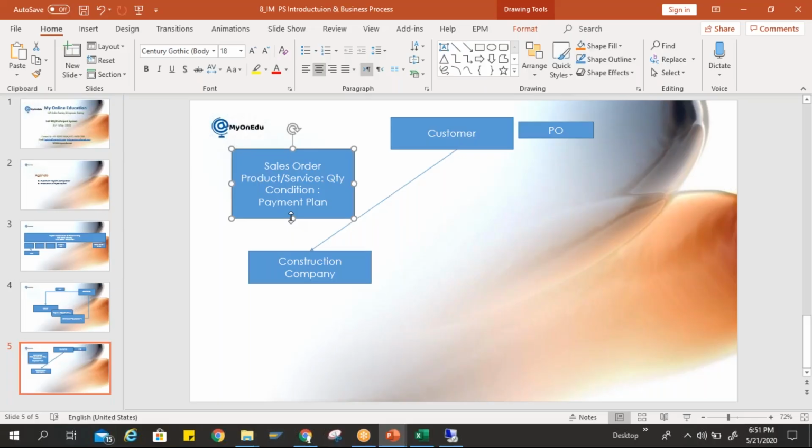So whatever the total values I am getting through the sales order, this will become my plan revenue. That is the one way. And this plan revenue I'm getting on my project through SD. It is automatic. So when I'm planning the revenue through the SD sales order, we call it automatic revenue planning. And all these activities have to be done in the SD sales order.